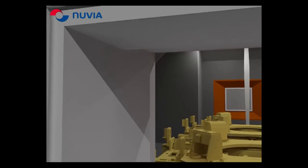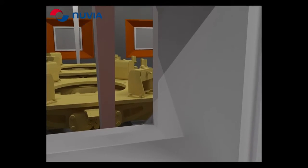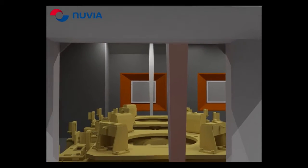Another key item associated with performance is the functionality. An early stage of the design tends to change with time. So we're considering that functionality all the way through those process steps. During the design, how the plant performs during installation, how there are optimised ways that we can actually deliver those installation routes. Also during construction itself, are we going to pour walls in a slightly different configuration? Can we hand over parts of the plant in a different sort of phased approach? That tends to reduce our overall delivery duration as well, makes the client very happy, but we also need to focus on the final operation performance of the plant too.